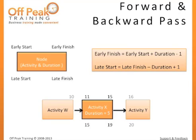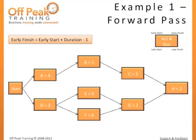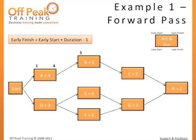Now let's solve an entire network diagram. We will begin with Task A. Since it occurs based on the start of the project, the earliest it can possibly begin is the first day. Using our formula — early start 1, plus duration 4, minus 1 — the early finish equals 4. So A can begin as early as the first day and end at the earliest by the end of the fourth day. Since Task B depends on A, it cannot start until after A's early finish, or the beginning of the fifth day. Using our formula, 5 plus 5 minus 1, the early finish is 9.